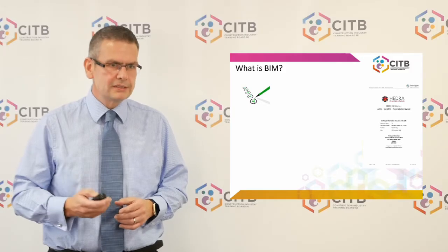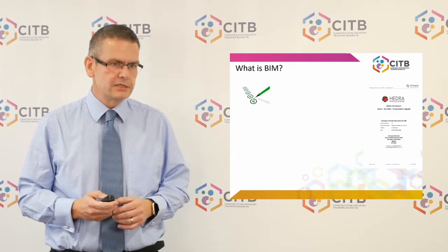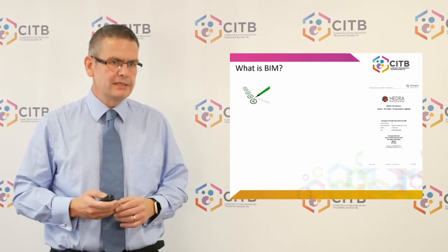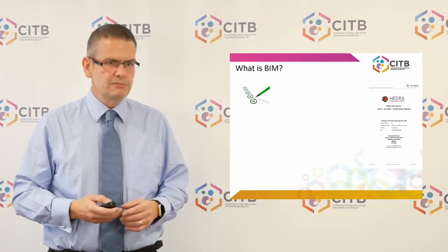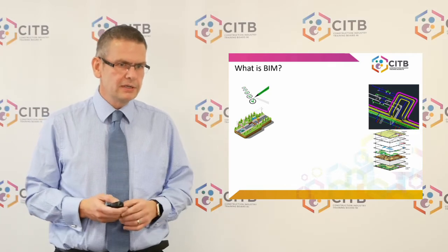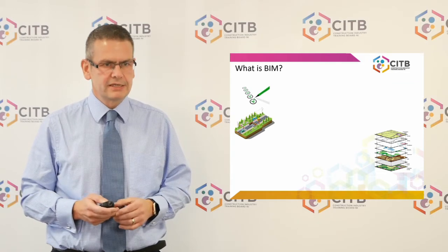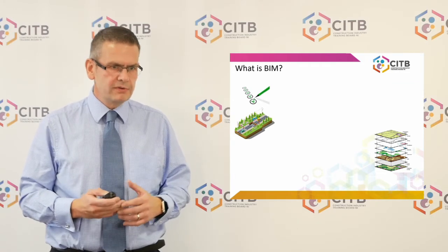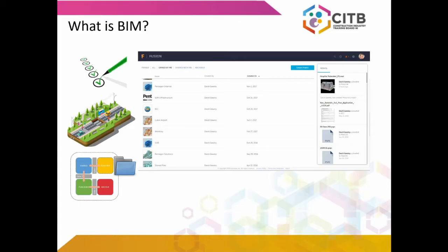So what we like to say BIM is about is it starts off with very clear information exchange requirements, which is set by the appointing party or the client. Industry responds to that. They respond with a BIM execution plan, that's by the appointed party. And they look at mobilization and how they're going to assess their supply chain. So we feed in information containers and different bits of data. But we do this in a collaborative manner.